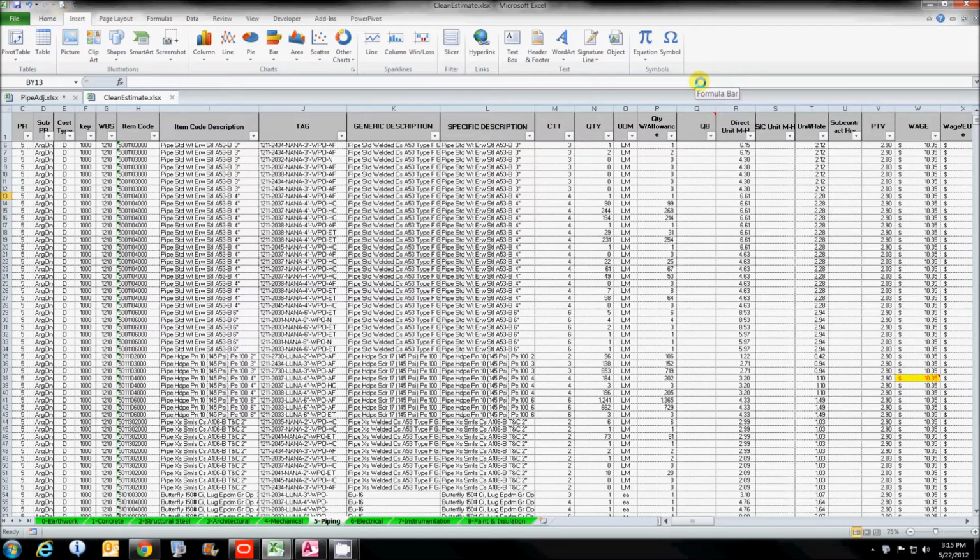This is the Class 5 estimate. I cleaned it up a little bit here. This is the Excel data dump that you'll get from most estimating programs. I wish I could say there's a standard, but there is not. Whereas most scheduling is done, at least in oil and gas, in P6. You get different data dumps from different estimating programs, and in fact, many of the larger companies have proprietary estimating programs. So this is simplified just to these tabs here.